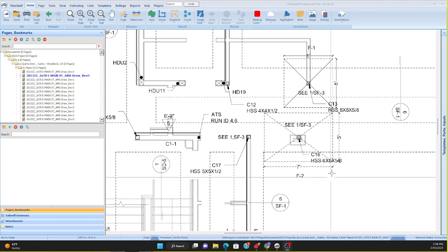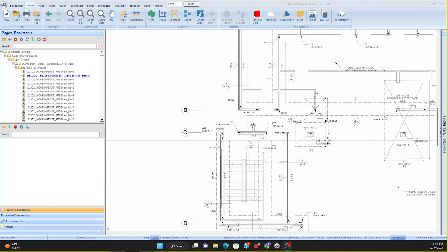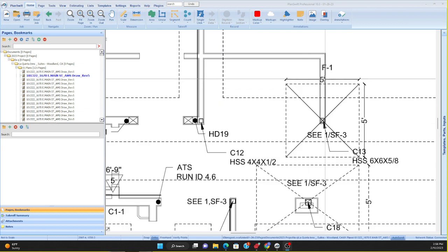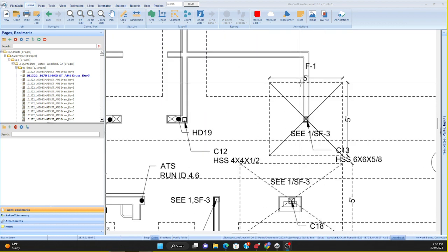Column 18. That's that. Oh, that's crazy. See, and the bigger they are, the crazier it is to determine the size, because a common cost book probably won't go any bigger than 3 feet by 3 feet. And then you can extrapolate, right? If you know what 3 feet by 3 feet is, then this is what percentage of that. This is 5 feet by 5 feet. Well, that's 100 plus percent, right? Because 3 feet by 3 feet is 100%.